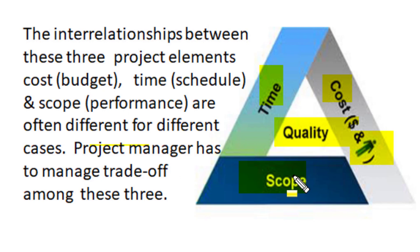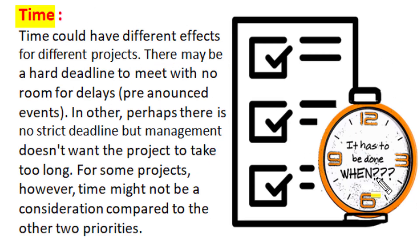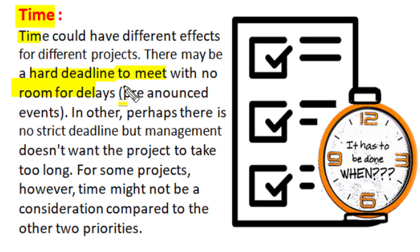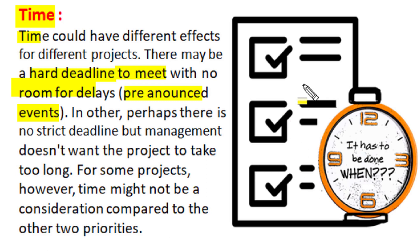Scheduled time or time of completion of a project is an important criteria specified at the time of planning. Some projects have a hard time deadline with no room for delay, such as projects tied to pre-announced events. In other projects, there is no strict deadline but management would not like the project to take too long. For some projects, time might not be an important consideration compared to cost and scope, which may become top priorities.